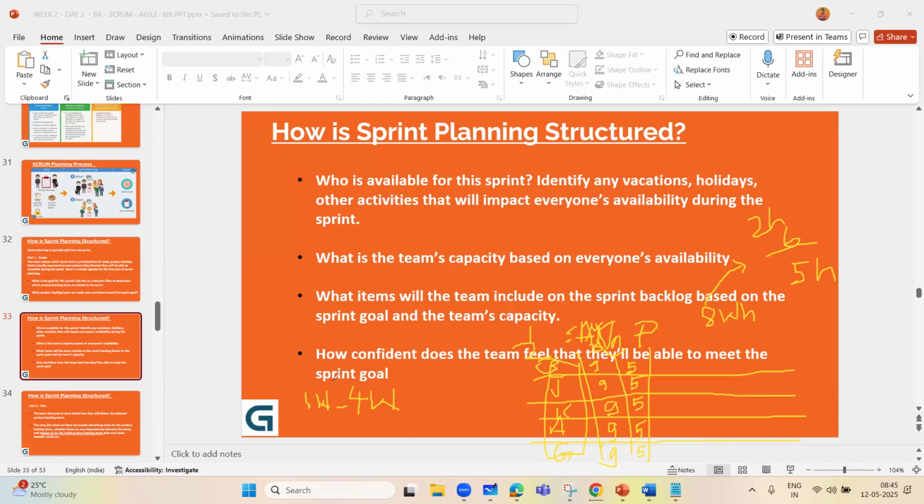So there are multiple factors on which the sprint duration is defined. And this is defined by the customer along with the product owner. Who defines it? Customer, product owner. Customer along with product owner. And it depends upon multiple factors like uncertainty of the project. Requirement is still unclear. If your team is immature, meaning the team is quite new, you have freshers in the team, and whether it is matured or not, if there are experienced ones.